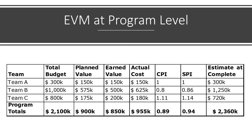When teams in a program are comparable in size and velocity, the agile EVM calculation can be made over the whole program. But often teams are not comparable — they work on different parts of the project with different velocities, different story point values, and different project costs. When teams have different characteristics, we need to calculate the earned value for each team and then add them up to a total earned value. Similarly, calculate the planned value for each team and add them up for the total planned value. From there, all EVM calculations remain the same.